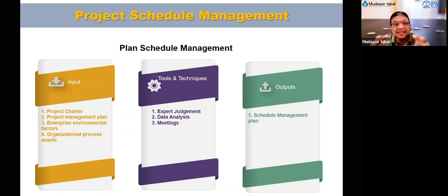This is a very comprehensive plan for you and for all of us, so that we can actually deliver the project, a standardized project. All of us can know that our threshold is 10%. All of us know that the unit of measure for measurement is weekly. All of us know our contingency for delays and what processes we have made, so that if we are 5 or 6 project managers for our housing society, we all can follow the same guidelines. Any question?